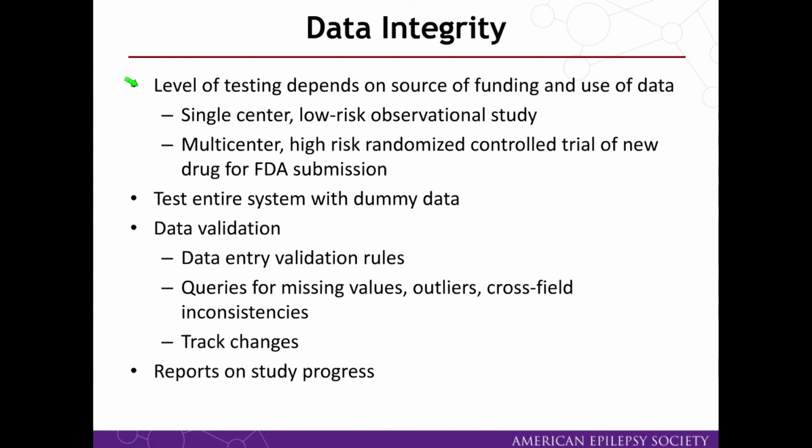So data integrity is a really critical component of your project. The level of testing for data integrity depends on the source of the funding and how the data is ultimately going to be used. So for a single center, low-risk observational study, the level of testing will be fairly low. But if you have a study that's going to be used for FDA submission, this needs to be much more detailed in terms of data integrity and validation because of the risks involved in the trials.